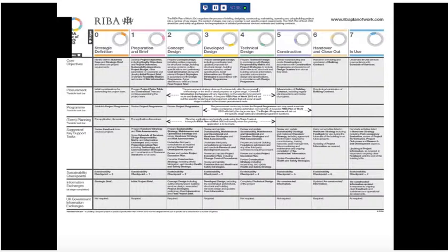And so the reason it's changed is, do you remember I told you that the university here employ a contractor here at Concept Design? Well, in the old days, we always employed a contractor there. And there used to be a little stage there, tender. But you can't do that anymore. So there's these great splurgy bits which show, depending on your approach, depends on where procurement takes place.